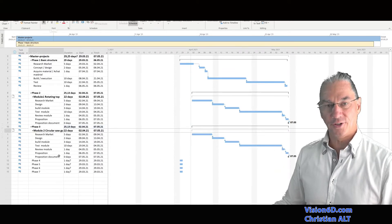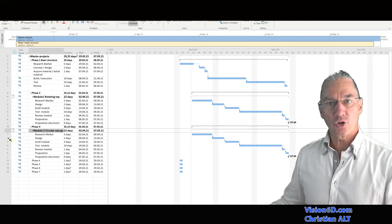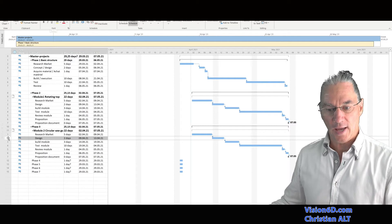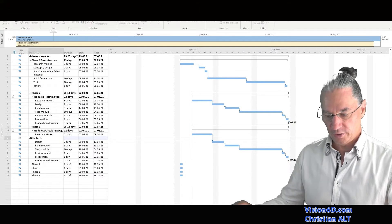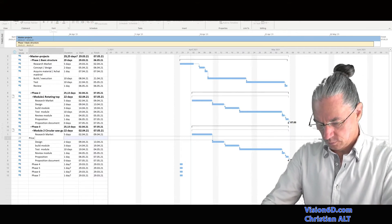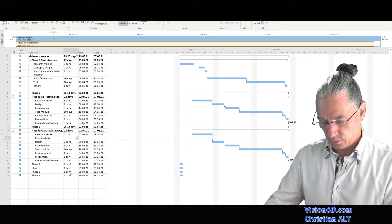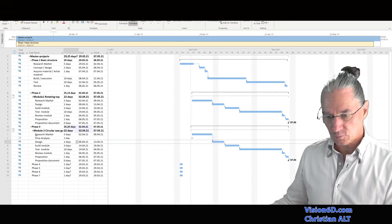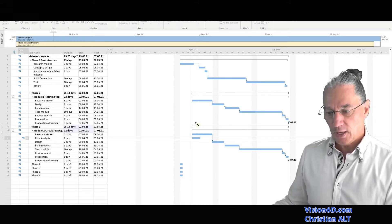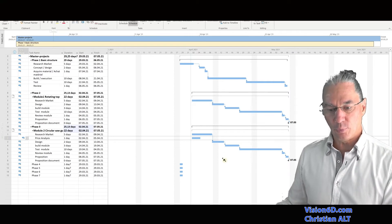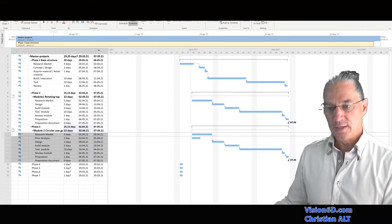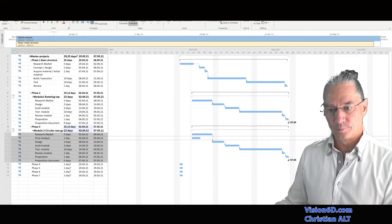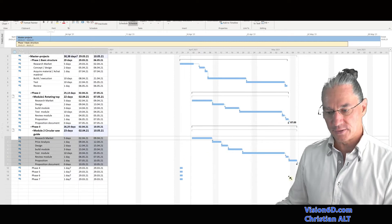And we find it here. While I was doing module two, there was a situation in which I had to do a price analysis. So I'm going to add this as a task directly into the master. And I'm going to call this price analysis. Duration was one day, and I will say that this task is auto-scheduled. We see that this task is here reported. So I will now select all the tasks and I'm going to say that I unlink them, and I'm going to sequentially link them all like that. It's easier to do it in that way.